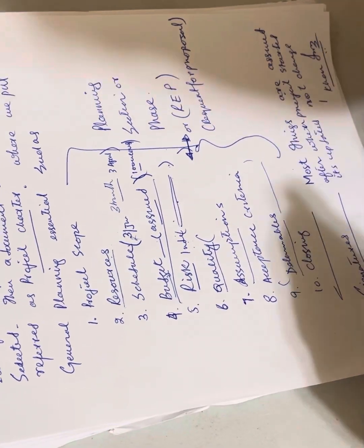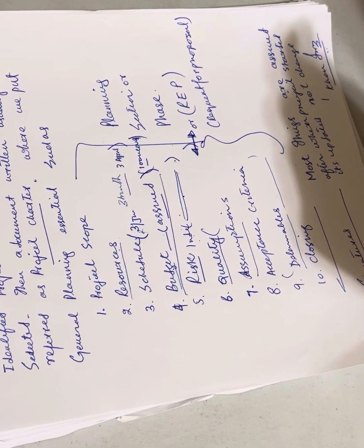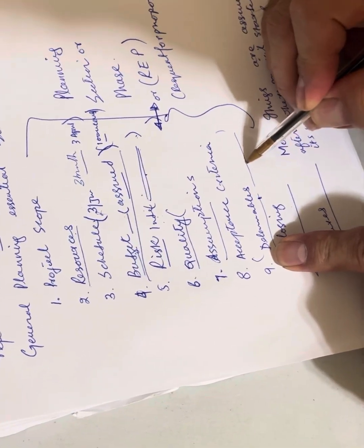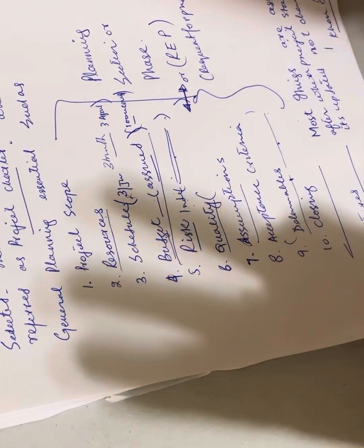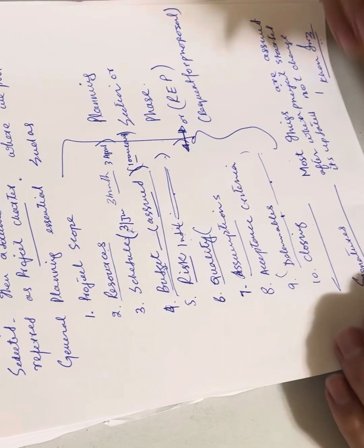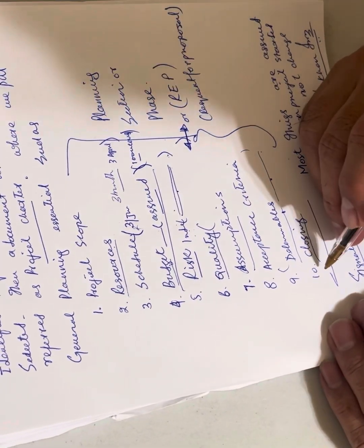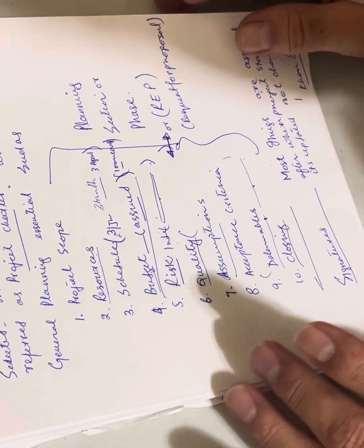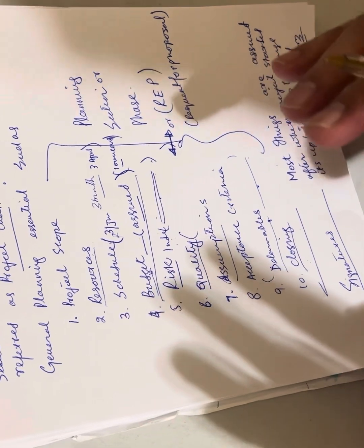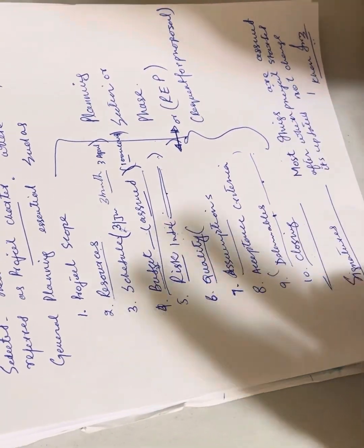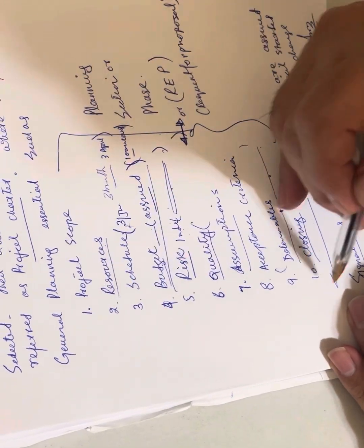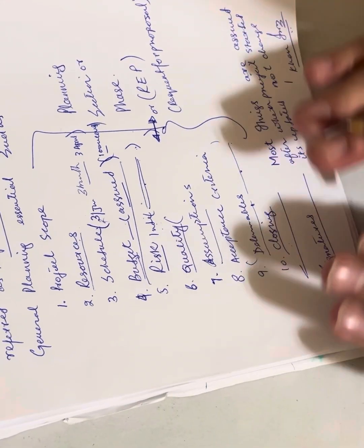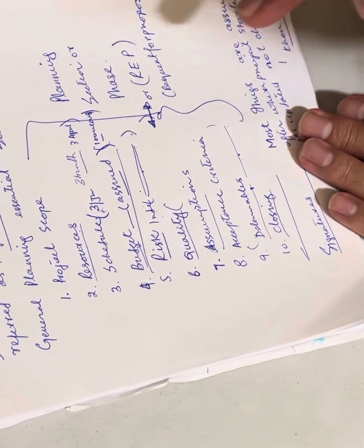And then the deliverables: what the sponsor or the organization wants delivered. Maybe every month we deliver one, in the second month the second, and in the third month the third deliverable, and the project ends. And then we write down the closing in the project charter. It's to close everything, with lessons learned and documentation, and we archive all data and documents. So these 10 things we put in the project charter, and then at the bottom we get signatures from the sponsor and from the project manager or the people performing the project.